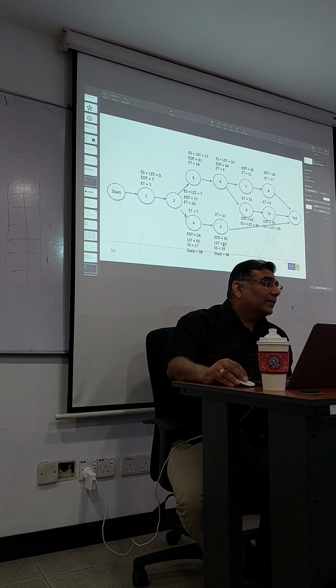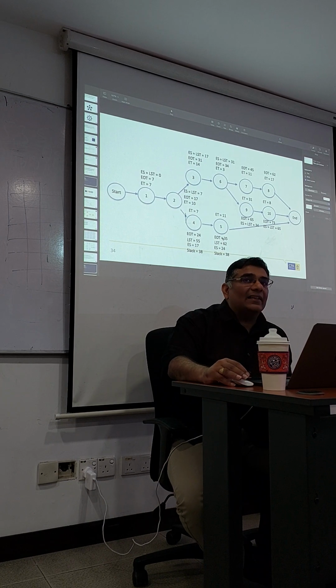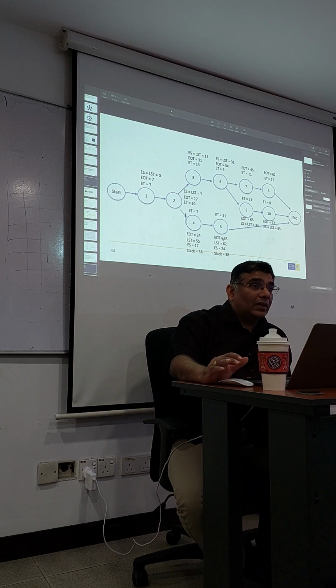Which one, this one? 73 minus 11. 73 is the longest time. This one end at 73, correct? Yes. Critical part is 73, correct? So the project finishes on 73 days. Here take 11 days, right? Yes. 73 minus 11, that's your latest start time. Guys, are you okay?